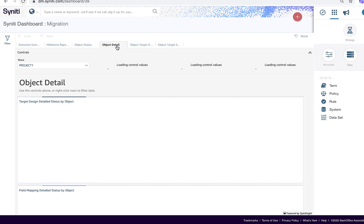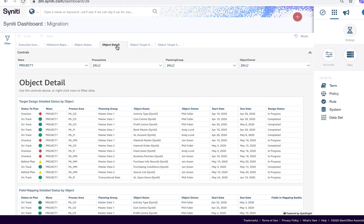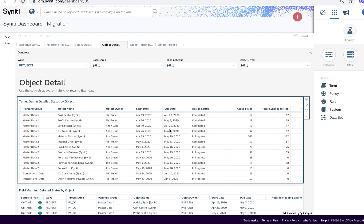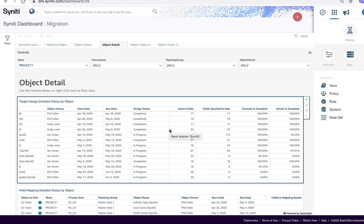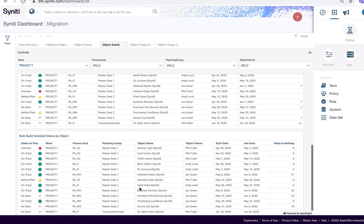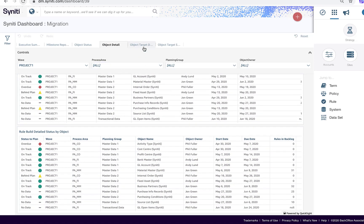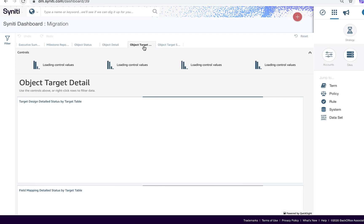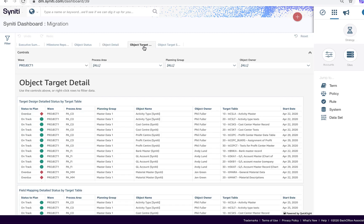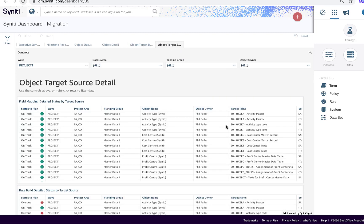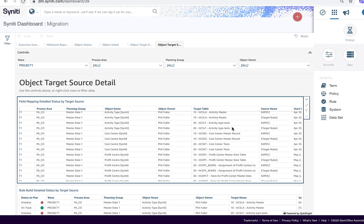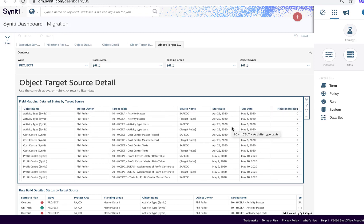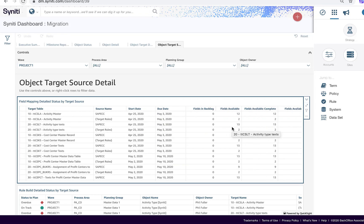Dashboards can be filtered by wave, process area, planning group, or object owner, allowing project managers to drive team status meetings using the dashboards. If issues with an object status are identified, lower-level target table information can be accessed, and in cases where data is being migrated from multiple data sources, it's also possible to drill into the metrics associated with specific sources.